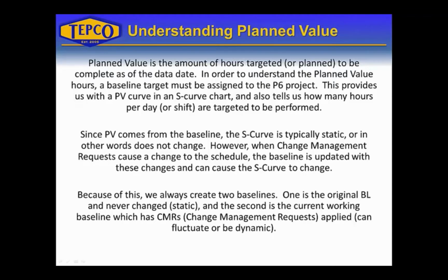Before we get started in P6 and Excel, let's talk about the different components of an S-Curve. Plan value is the amount of hours targeted or planned to be complete as of the data date. So in order to understand the plan value hours, a baseline target must be assigned to the P6 project. Since the plan value comes from the baseline, the S-Curve is typically static, or in other words, does not change.